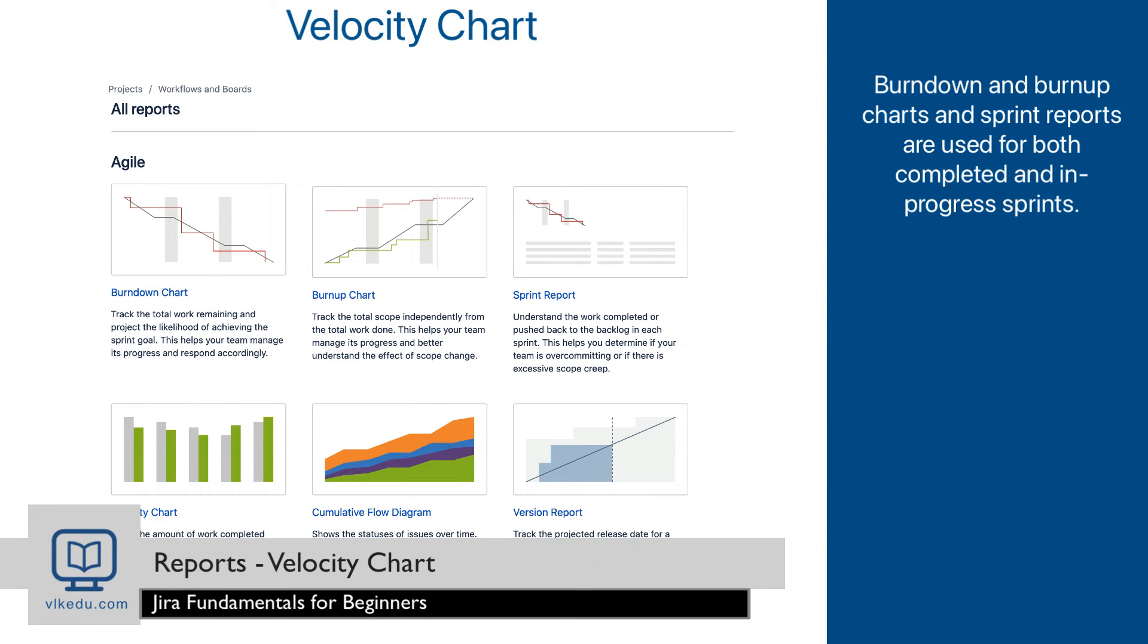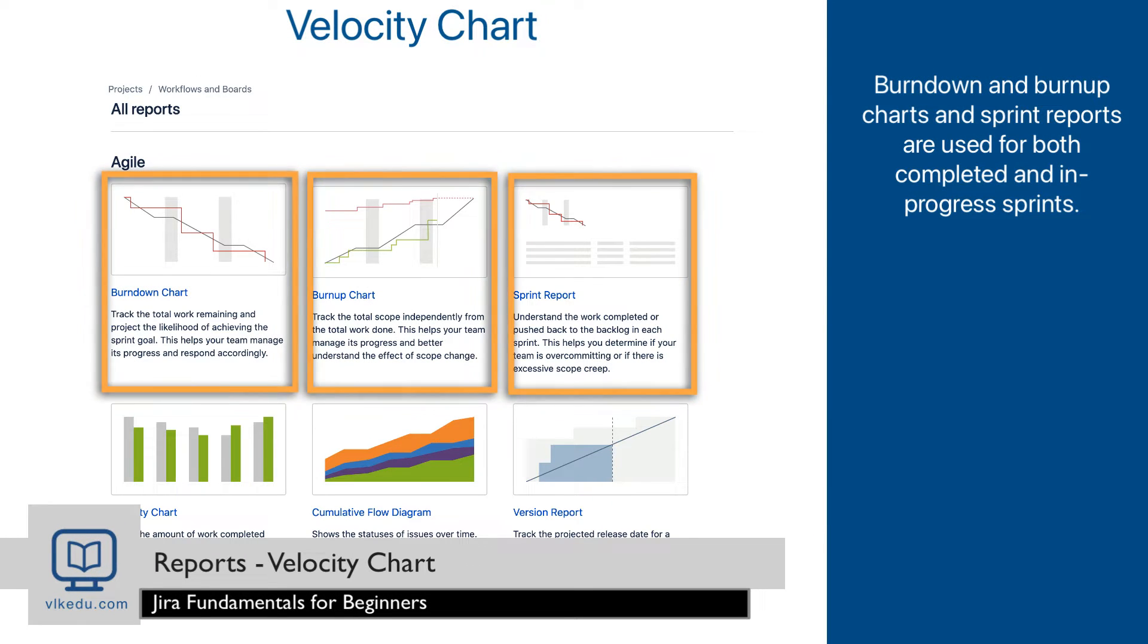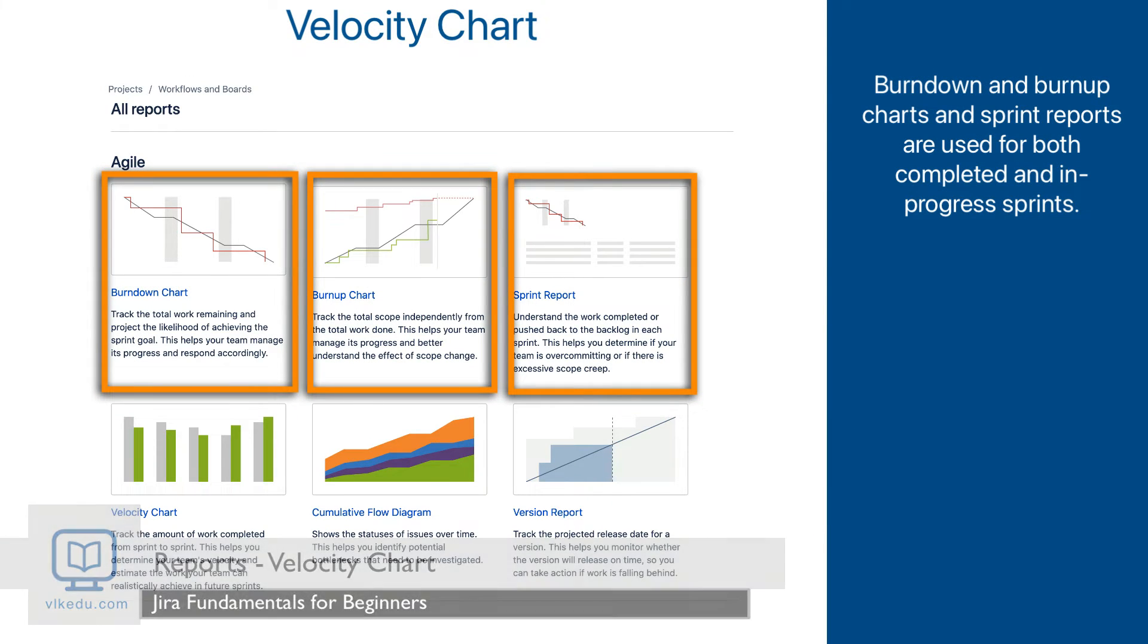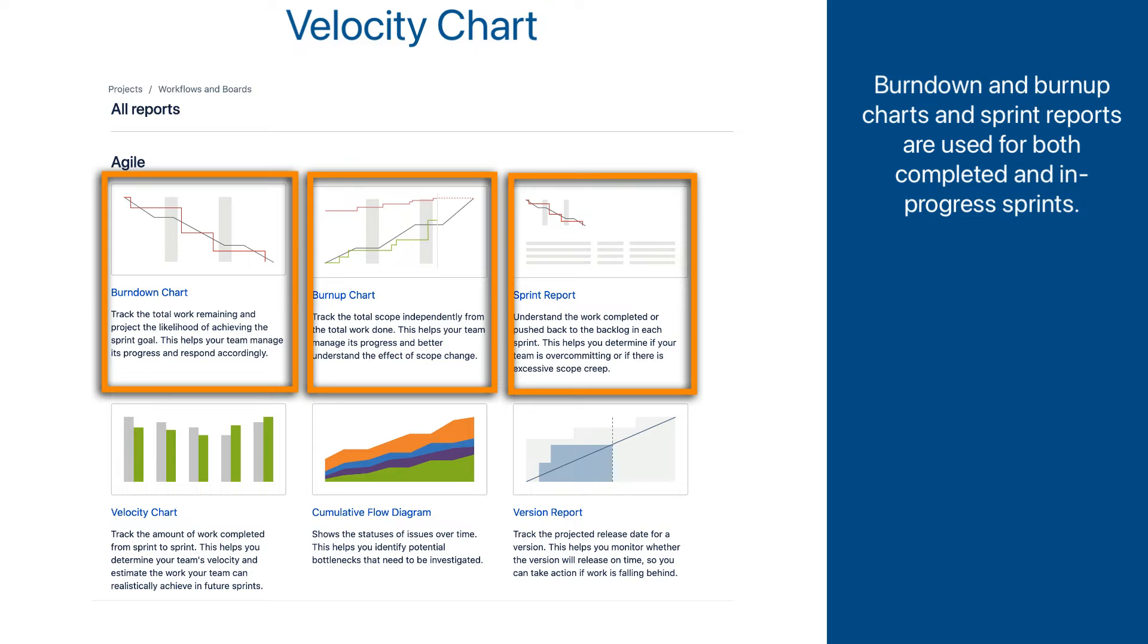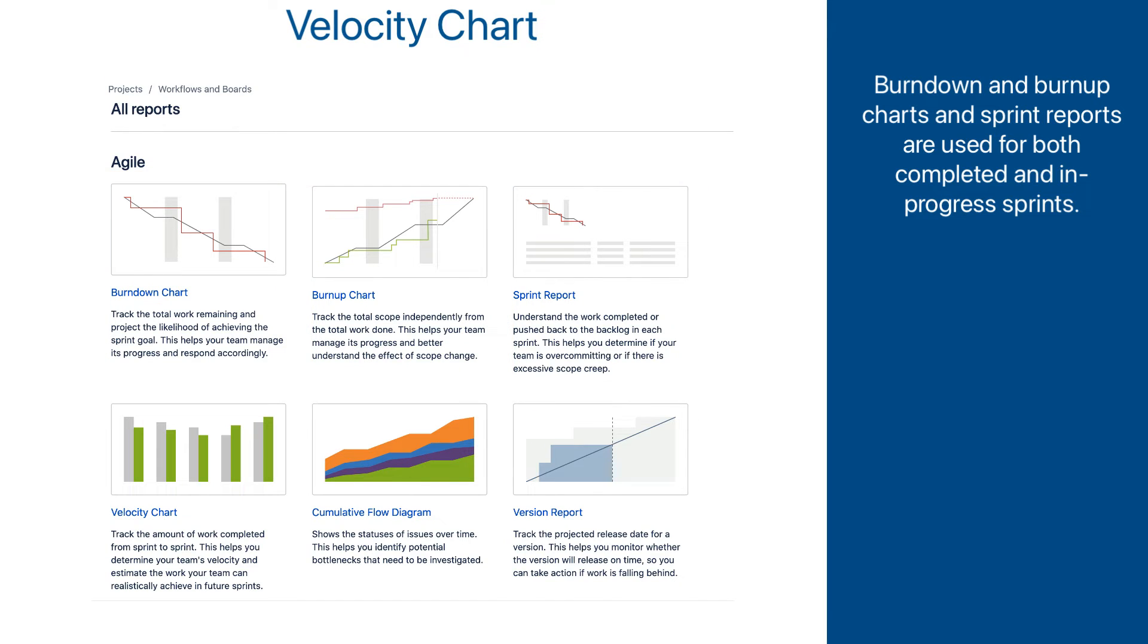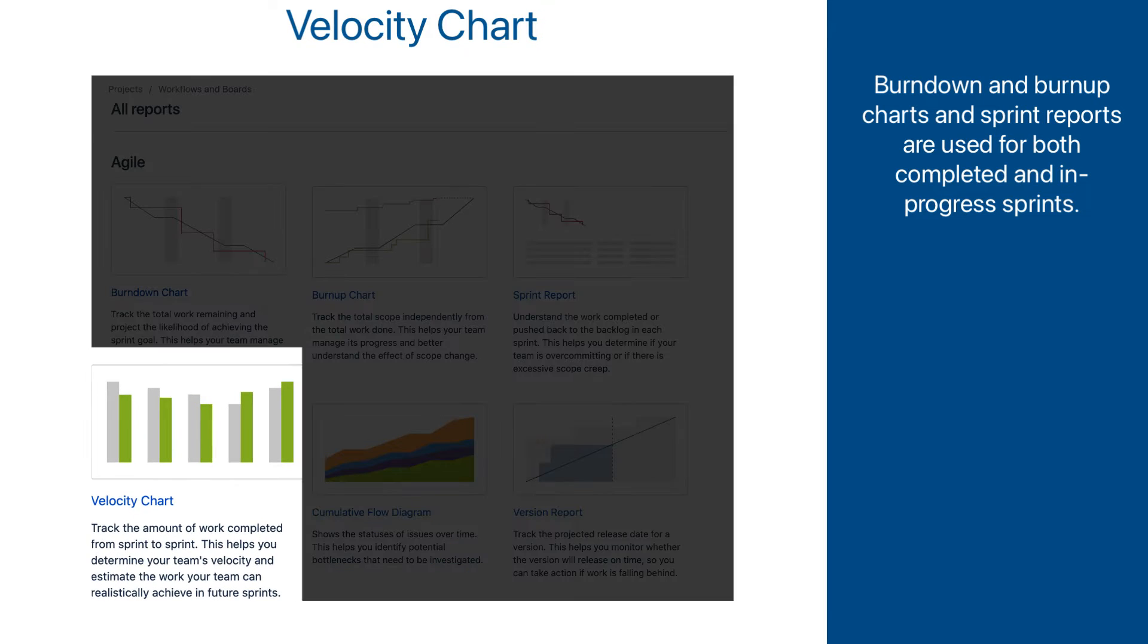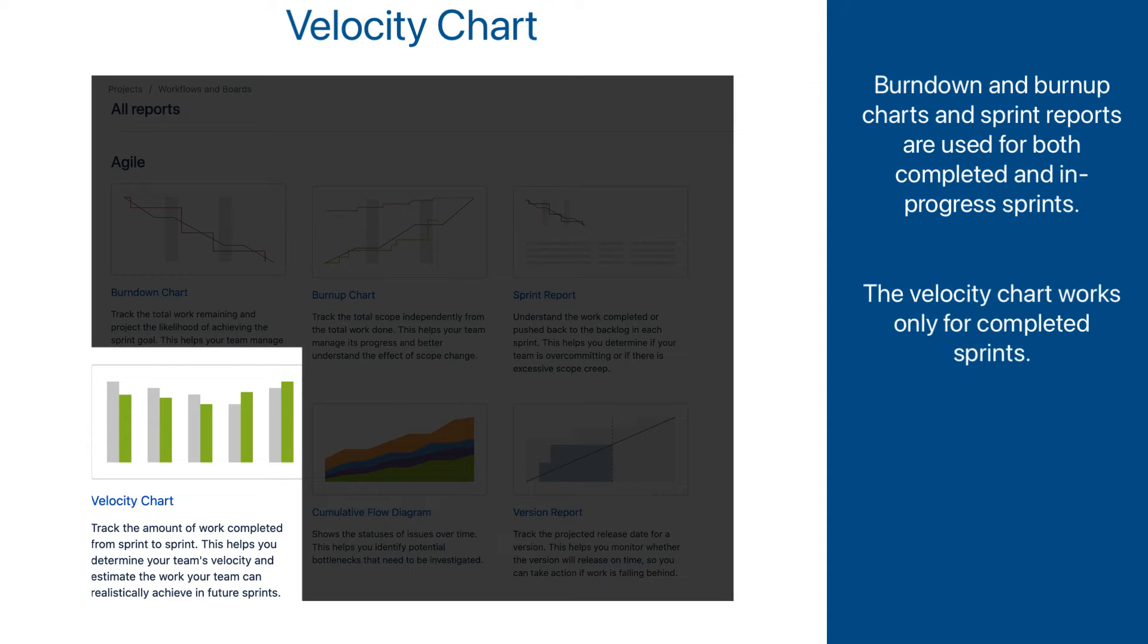The last three Jira reports that we reviewed - Burndown chart, Burnup chart, and Sprint report - are used in both contexts of Complete Sprint and Sprint in Progress. The Velocity chart is different in the sense that it is not applicable to Sprint in Progress and it only works for Completed Sprints.